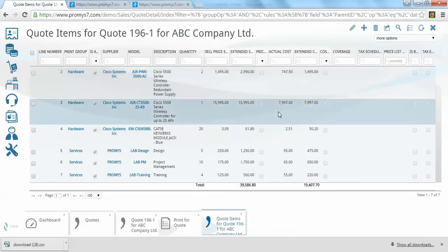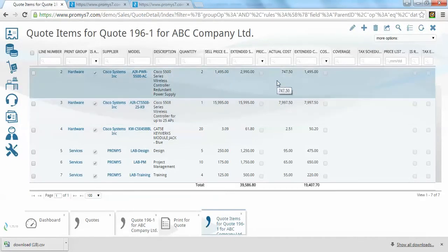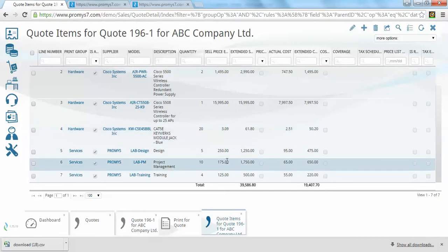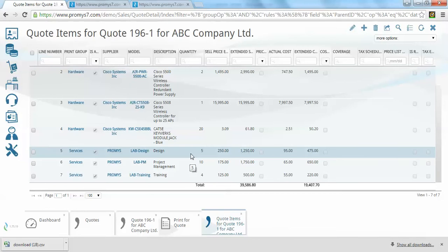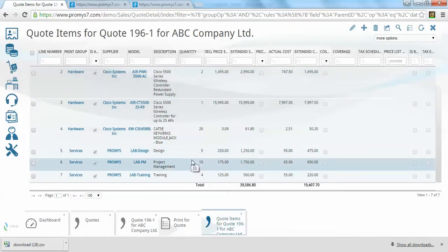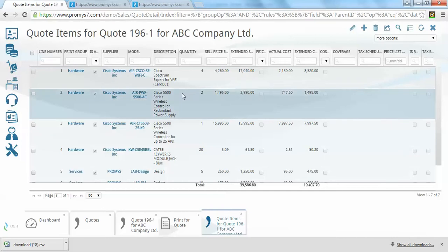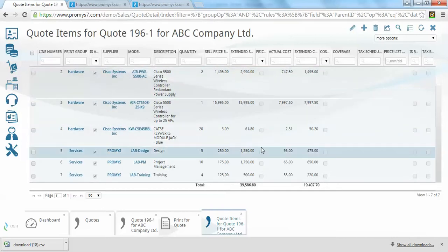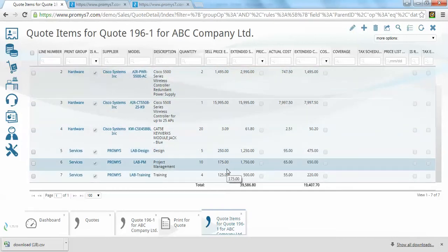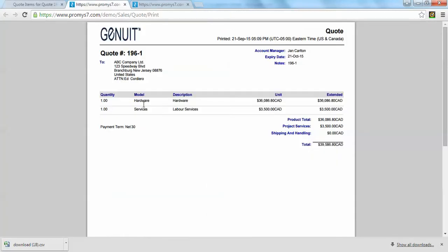So this is the presentation layer to the customer, the roll-up. In the background, I still want to keep track, from a job costing perspective, of the individual materials and the individual hours by specialized resource type, so I can get real-time visibility into the over-under of my cost against budget project performance as materials are consumed, as hours are assigned to work orders, and as timesheets are filled in. And we'll talk about that further in a few minutes. But where we talk about the project management process starting is in capturing a detailed bill of materials and a detailed labor estimate at the quoting stage to compare to actuals for job costing purposes, even though ultimately what's presented to the customer are two rolled up line items using what we call print groups.